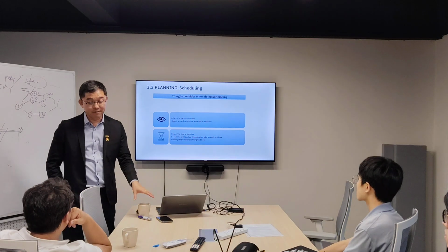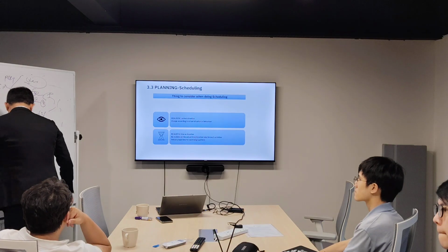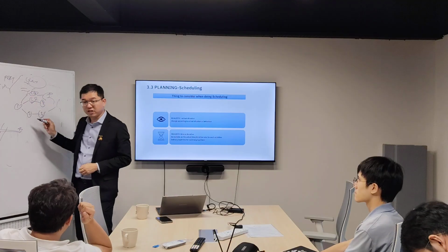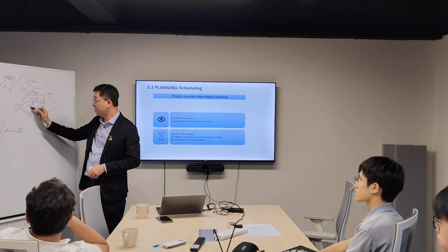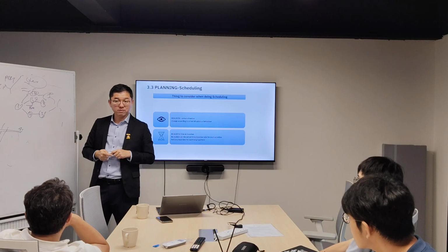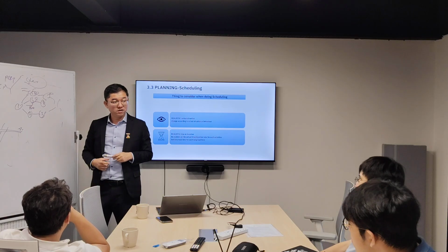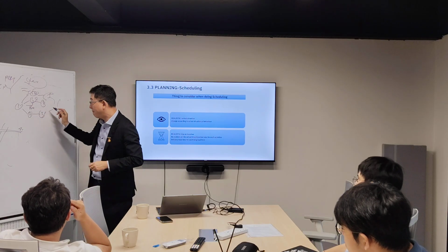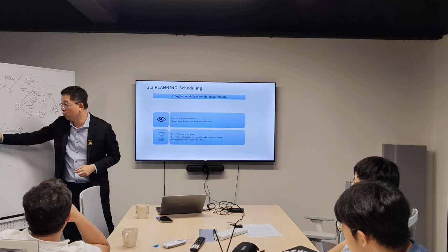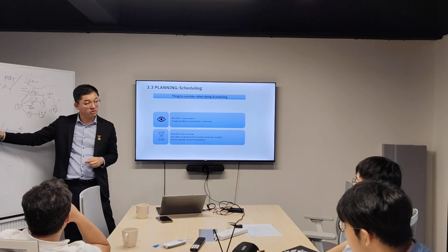And of course, the lead time. Lead time means there may be an activity of procurement of the transformer, as mentioned by Dr. Lee. Transformer, how long is the procurement? Basically, installing the transformer can be at a later stage when everything is covered. But you cannot order the transformer at a later stage, right?